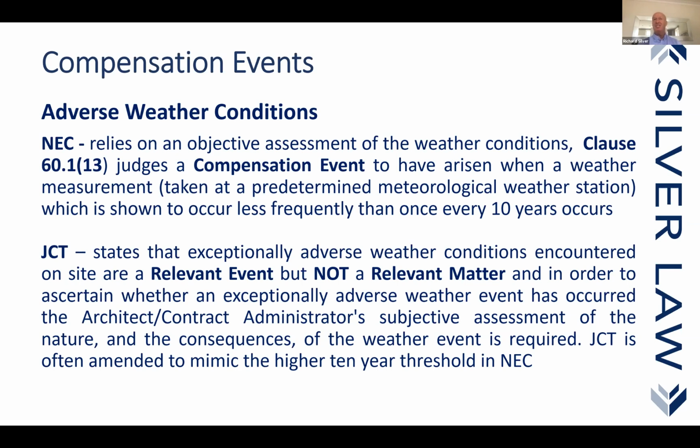And do remember, your quotation is meant to be done as foreseeable, what you foresee. Now, I see that it's a bit strange under the NEC. How can you foresee something when it's weather which has already happened? So again, there seems to be a slight mismatch there. So I don't really see how you can, in many ways, do a quotation, because it's always going to be after the event. And the project manager, if they've got any sense, will be monitoring what has actually occurred and therefore assess the compensation event based upon that. This is what has actually occurred, and therefore this is your actual entitlement.